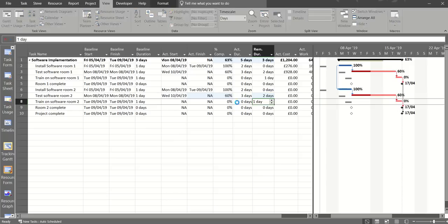So as you fill it in like this, you can see the percentage complete changing to reflect what you're typing. Now if this was a longer project, you could save another baseline, take another snapshot, and you can have multiple baselines to look at. But for now, that's all I want to do. I want to have a quick look at reports. So I'm going to go to reports.